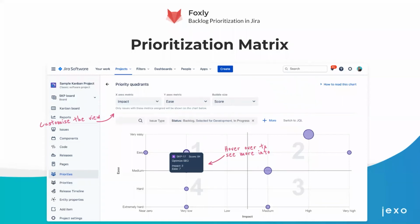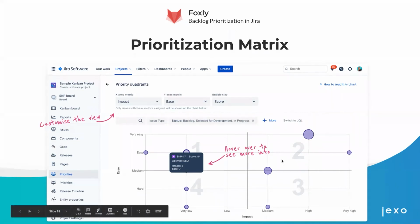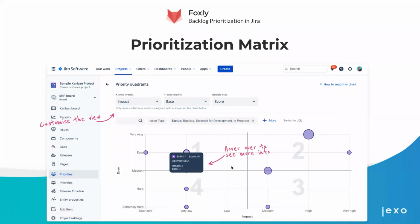So this view is quite important, and in Foxley you can customize what you see on the X and Y axis as well as the bubble size. In this example, the X axis is the impact, and the Y axis is the ease, while the bubble size is the actual final score. So it makes it very easy for you to spot items that you need to look at. And you can also filter based on stuff that's not done, let's say if you just want to plan and pick up work.